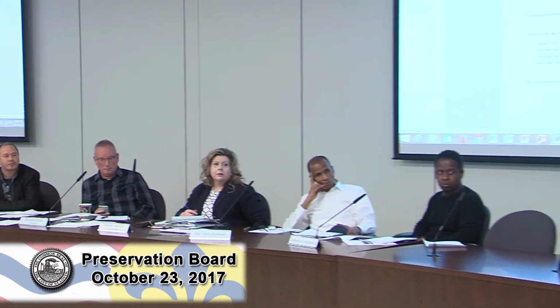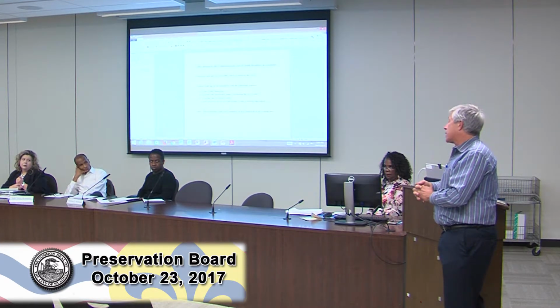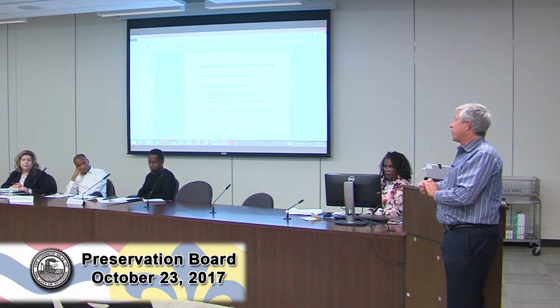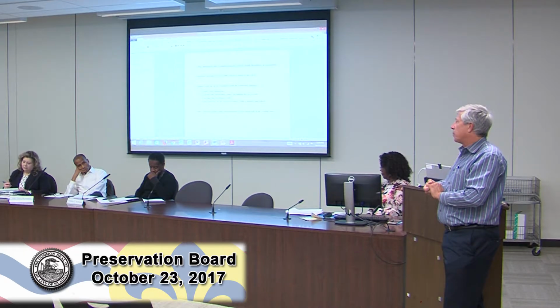One of the other things that I did upon Fred's recommendation is contact Joe Schoonover, who's over in Kansas City, who is doing what he calls deconstruction, which is the takedown kind of surgically of the building with the idea of saving and reutilizing the parts. Joe gave me some numbers. I'm just going to ballpark it because I have taken down one other building and assisted other people in doing that, but each structure would probably run 10 to 15,000 for the small ones and probably 20 to 25,000 for the big ones. And that would be offset by the brick content. That would be the demolition cost. So if I had to ballpark it, I'm probably talking about 150 to 200,000 to take it down.